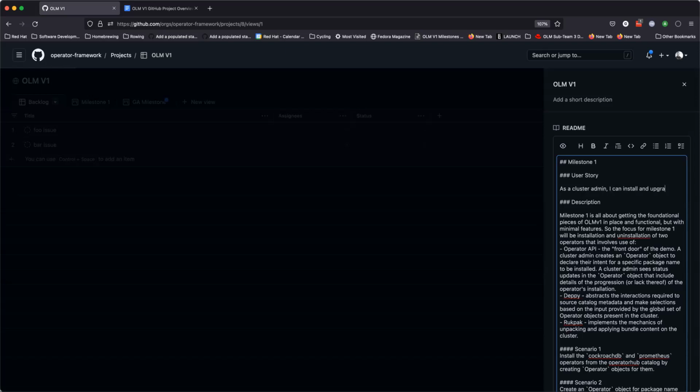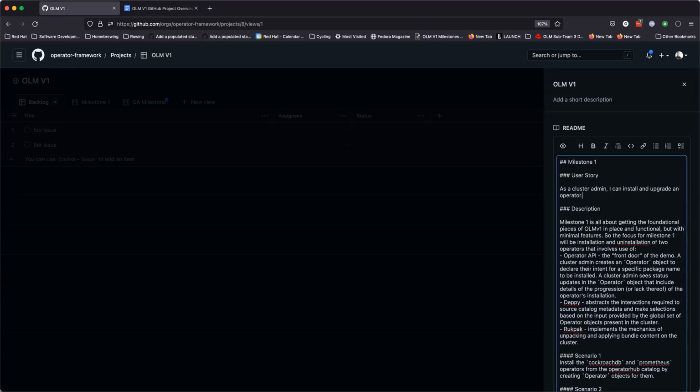Yeah, and I kind of think that this very first milestone is probably going to be a one-off, because we just need to get a lot of stuff in place, right? Once we have that in place, it's probably much easier and smaller in scope to say, okay, the next milestone is just a more incremental change than this first one, which is just about getting the bits in place to actually be able to deploy to a cluster, and having the base level components that we know we're going to need for future milestones. I don't know if you feel the same way, or if others do.